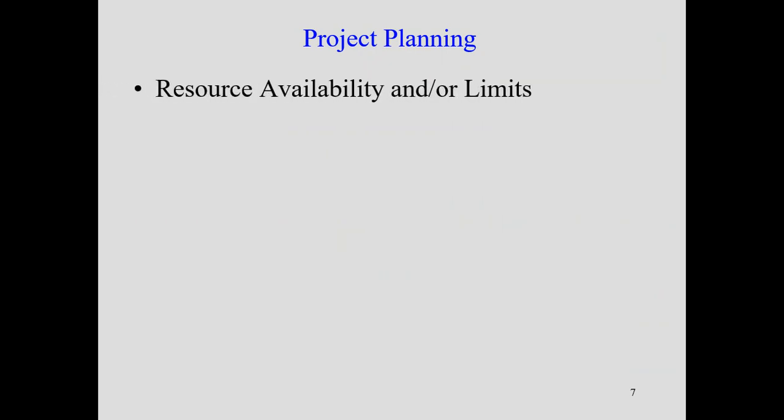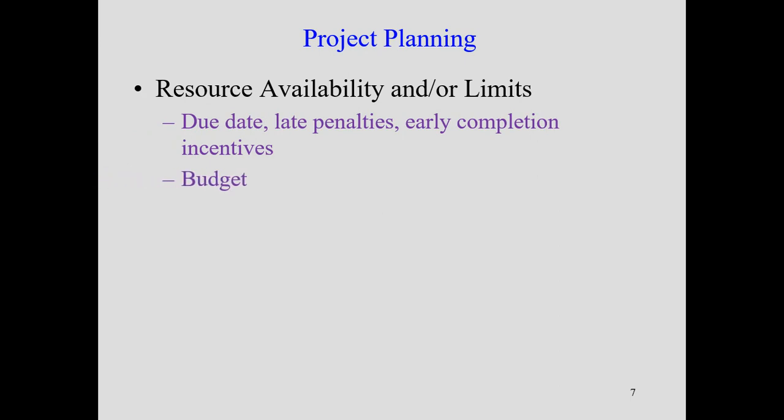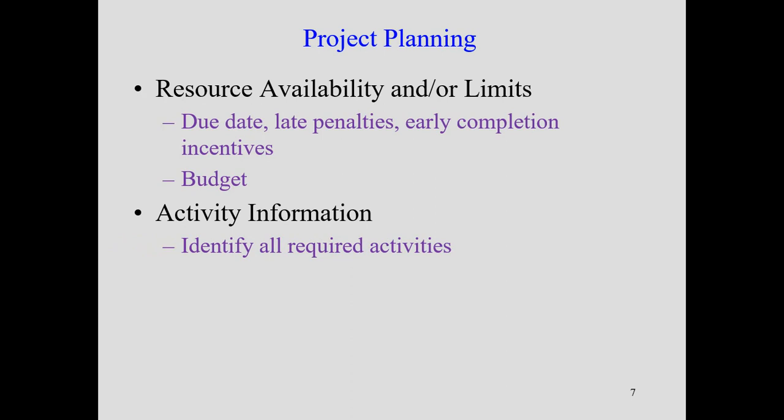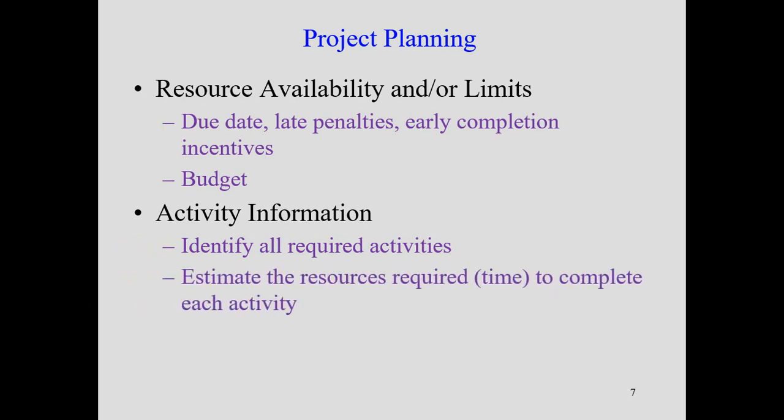Now the important step in project management is project planning. Here we'll be looking at the availability of the resources and their limits, the budget, due date, the penalties, early completion incentives, etc. We also will be looking at the activity information: identify all required activities, and estimate the resources required and the time to complete each activity.